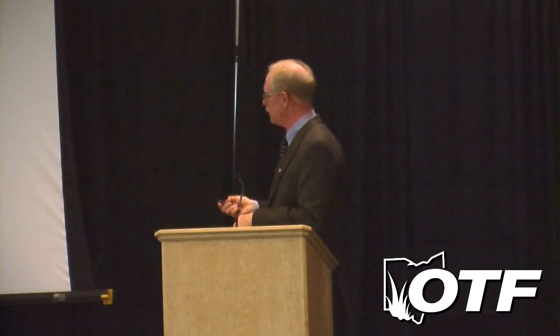Okay, now another case study. Country Club of York, getting closer to Ohio. York, Pennsylvania, really good Donald Ross golf course. And their project was $570,000 for only 59 bunkers, and it totaled a little bit under $9,700 per bunker. And you'll see in a minute why.